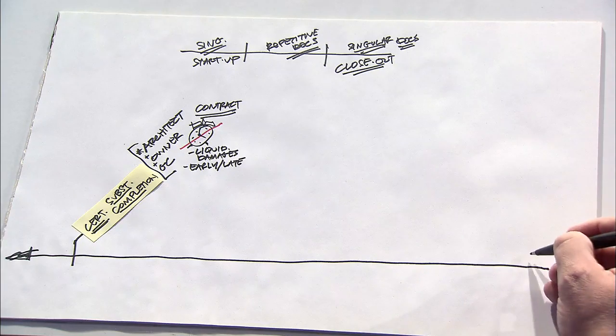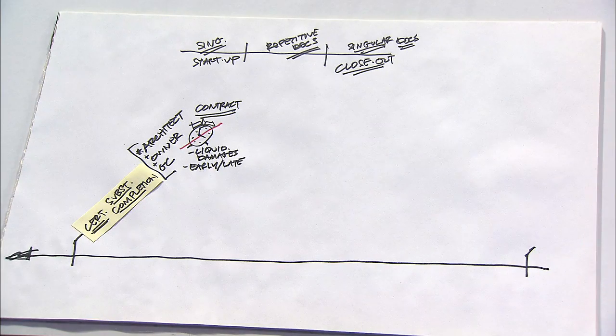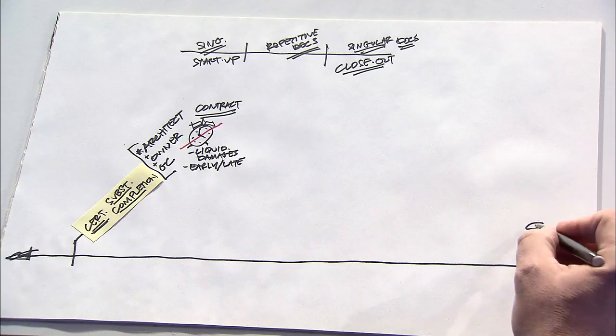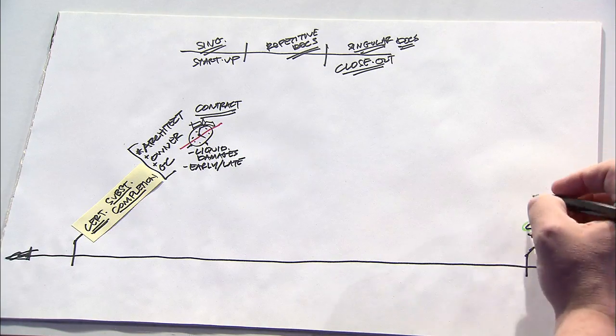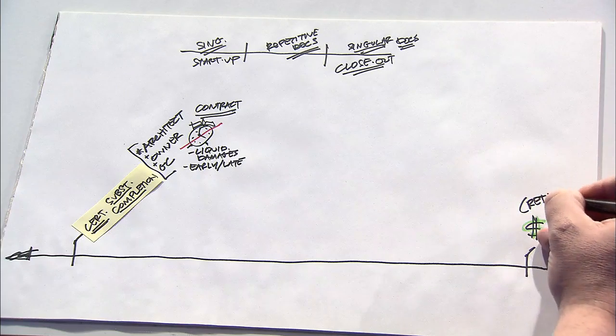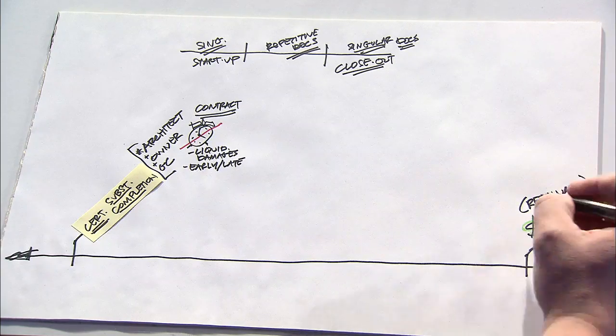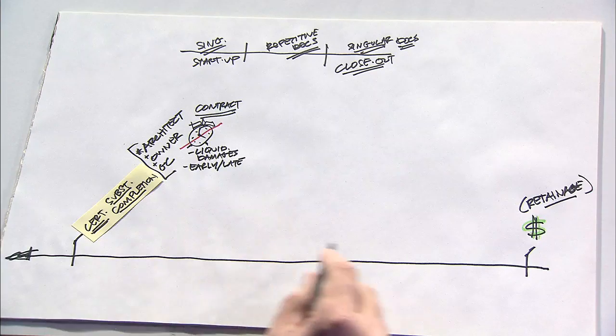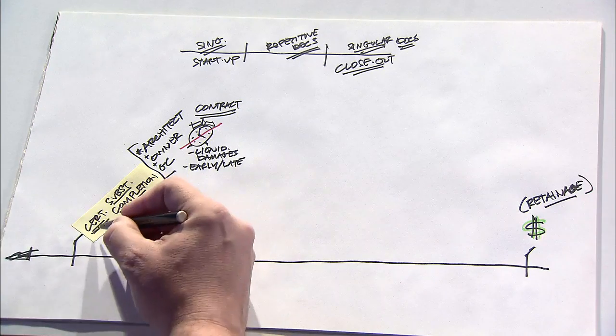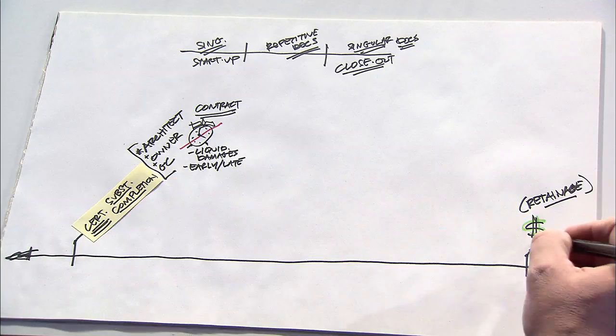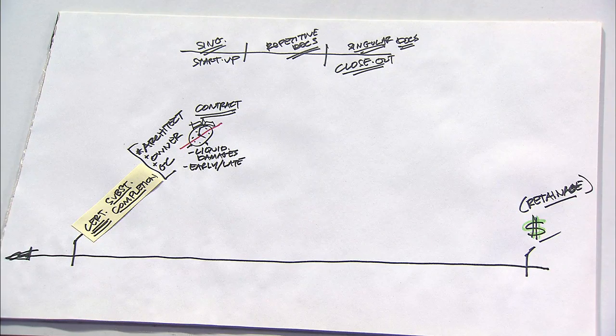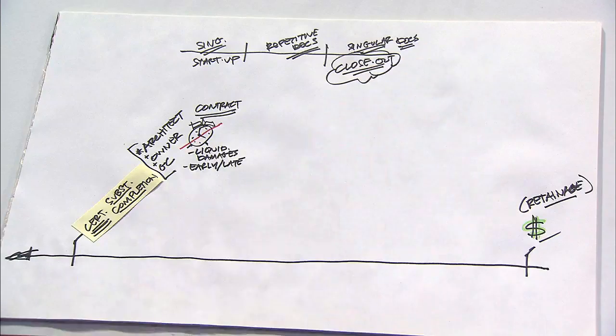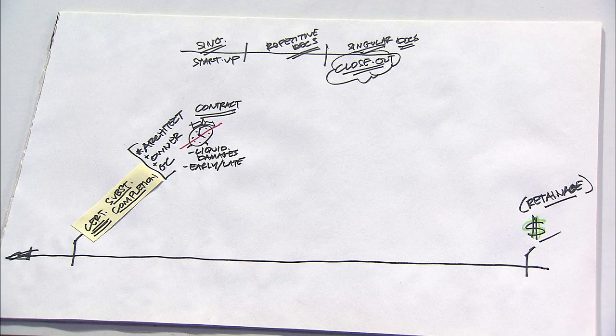Now I'm going to skip ahead to basically the last thing that happens on most any project, and that is the receipt of the last dollar by the contractor. And typically, this last dollar represents the retainage that was being withheld based on the contract terms. Now, we'll populate this space in between the Certificate of Substantial Completion and the release of the retainage dollars. There are a lot of very important closeout documents that have to be issued in that time frame to close out the job appropriately.